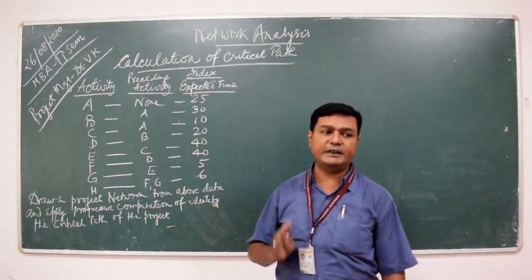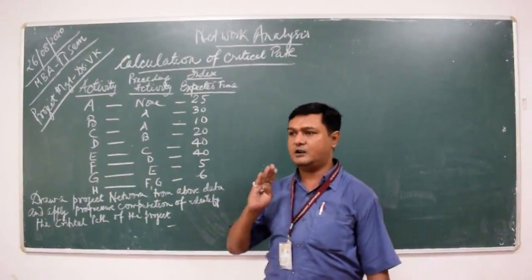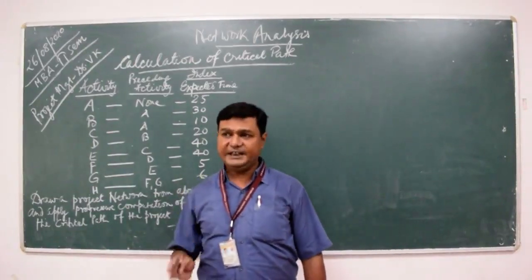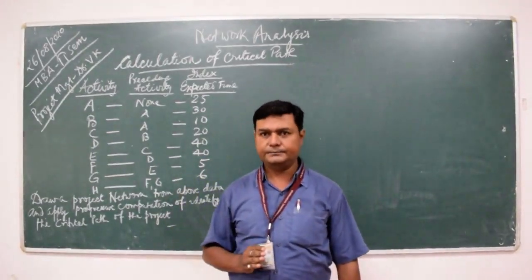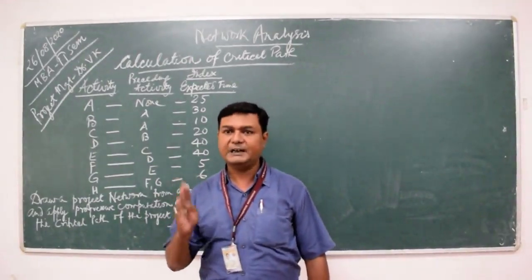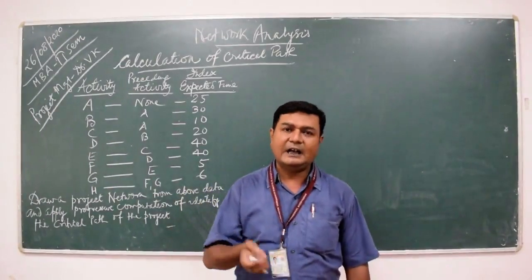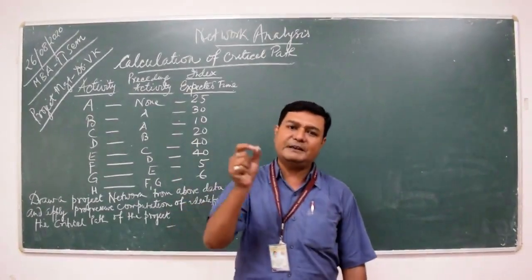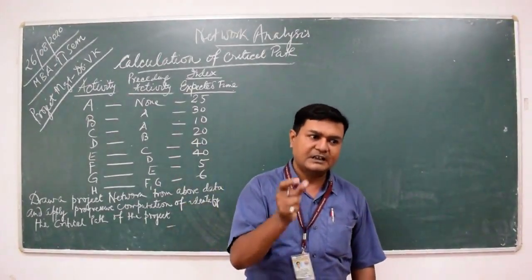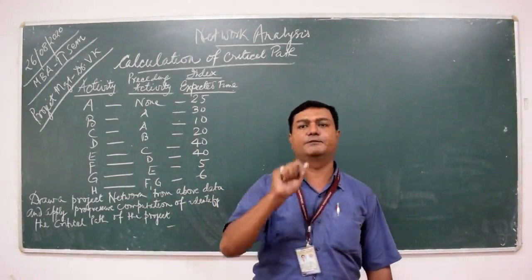The rules say that if you do not have any data about the events, don't worry, because an activity will always start from and terminate into an event.